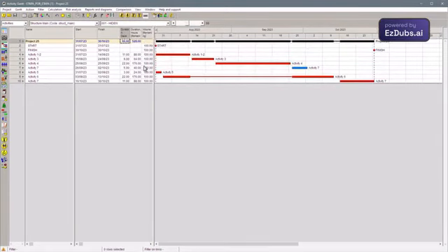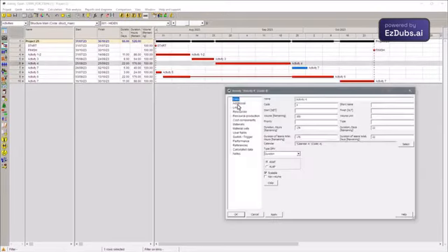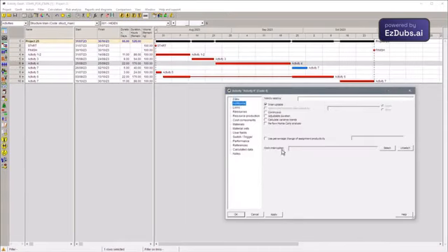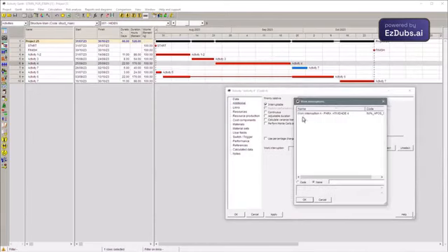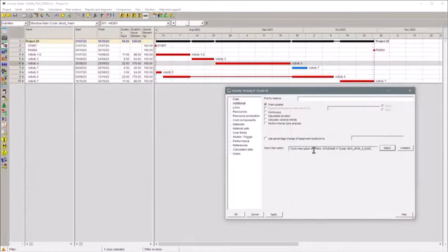The tool's second feature is to transform the activity, not into a single activity, but into an activity that can be done piece by piece, called work interruptions. I'm going to select the interrupt that I've already prepared, which says 50% after 5 days. This scheduled interruption will be applied to activity number 4.